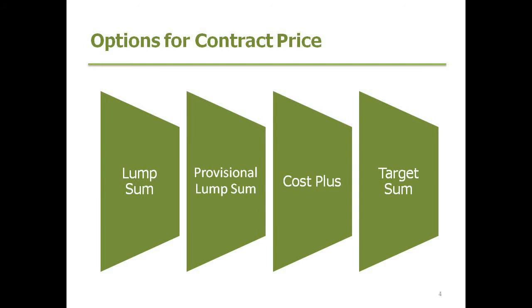One method is lump sum or fixed price. This is used when the works can generally be defined, the scope is known, and all the specific work and services can easily be ascertained and quantified before any work is taken out. The risk is low to both the builder and the client. So as I said, the brief is complete, design documents are very accurate, and the principal won't be changing either the brief or the design in this form of contract price.